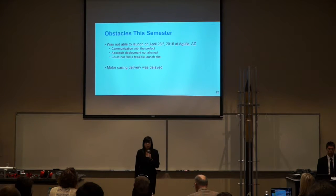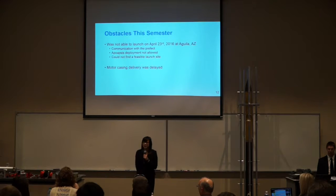Also, when we ordered the motor casing during spring break, unfortunately, two weeks later the vendor notified us that the factory caught on fire and delayed shipping for the motor casing. And so it actually, unfortunately, came in on Tuesday, as you can see here.